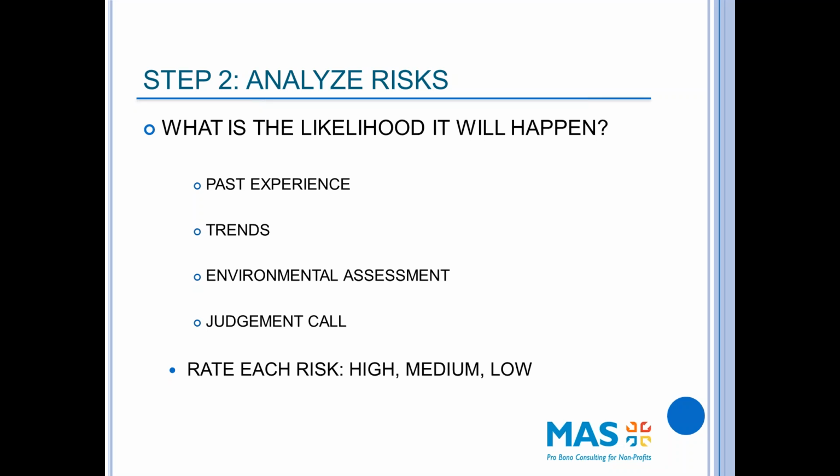Sometimes it's a collective judgment of the board. Sometimes it's the judgment of the executive director or someone else on staff, but it is a judgment. And essentially what you do is you assign a likelihood rating to that risk. There are very fancy ways to rate likelihood, but if you just think about it in 3 categories of high, medium, and low, that will work, at least as a starting point.